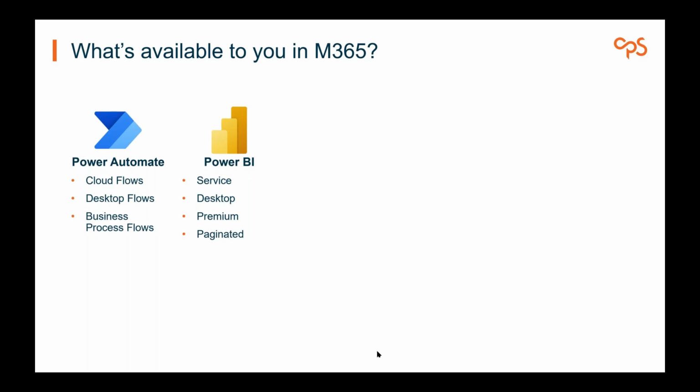Power BI comes in different licensing SKUs, and that can impact the features that you have available. So if you're after a highlight report of a project, then you may wish to use the premium side of Power BI, which enables you to do paginated reports that ultimately demonstrate your typical highlights, so risks, issues, dependencies, milestones, and give you that interface. Whereas typical Power BI reports are more interactive and they provide data visualizations that interact with one another, whereas paginated reports are more static and more repeatable.